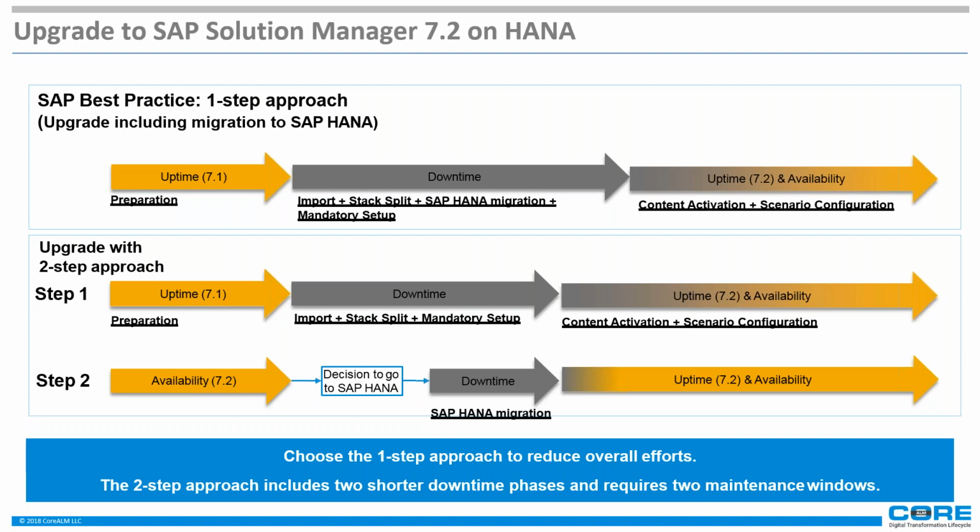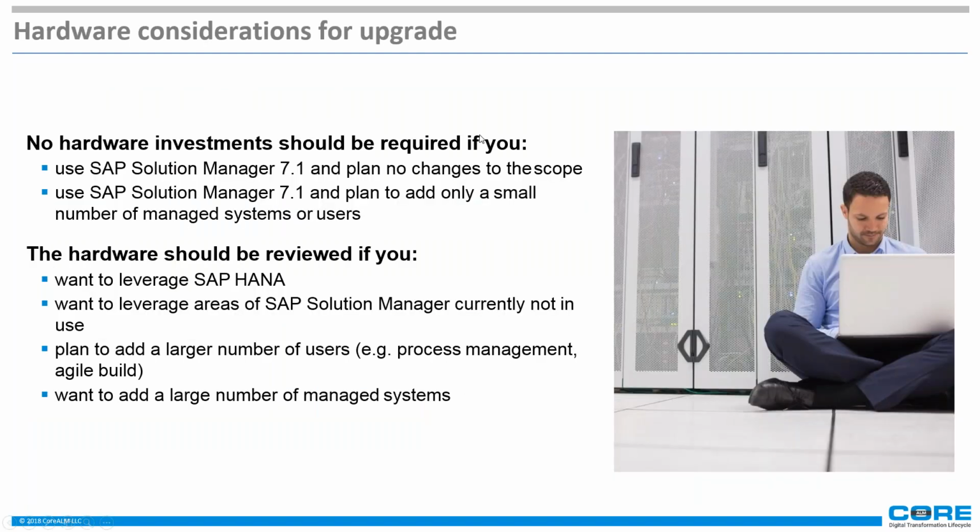Definitely, there are some positives about it. There are some things, however, where a lot more stars need to align for this to happen. All the hardware has to be there, and when you kick off projects, sometimes things don't go as well with hardware procurement, and that's what we've seen. But there's nothing wrong with scenario two, where you do the HANA migration as a separate step. Either option will work very well for you, depending on your scenario.